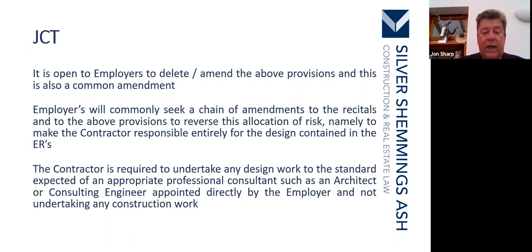This will make the contractor required to undertake any design work to the standard expected of an appropriate professional consultant, such as an architect or consulting engineer, appointed directly by the employer and not undertaking any construction work.